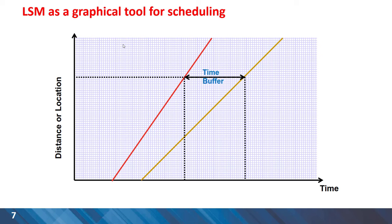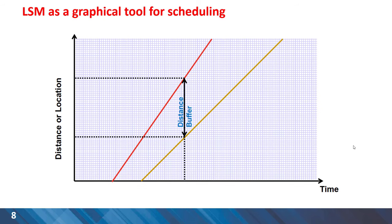For each activity in a linear project we can have a line representation and on the vertical axis we have distance or location and on the horizontal axis we have time. In this way, the gap between two activities shows the time buffer and the vertical gap between the two activities shows distance buffer.